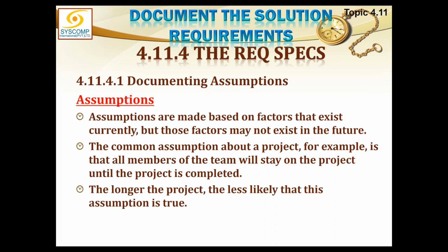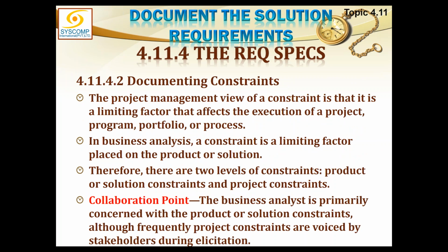A common assumption about a project, for example, is that all members of the team will stay on the project until the project is completed, which again might not be true. So as soon as this assumption is proven wrong, I must replace it. The longer the project, the less likely that this assumption is true.